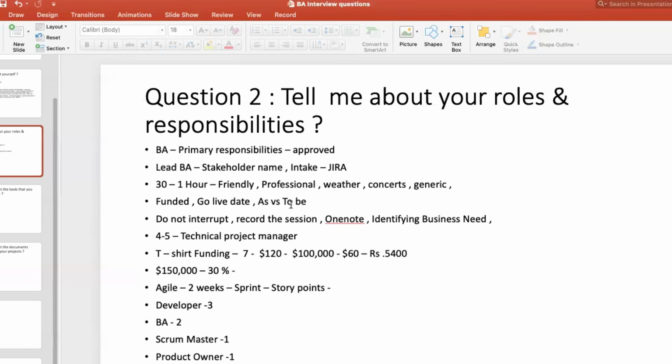So business owners have no clue about how IT projects work. Developers work all day, they work on weekends, on Saturdays and Sundays. If there is any production issue, they have to log in anytime. So when we are estimating budget, we have to understand that buffer. That 30% extra buffer that we are adding includes all these work hours.